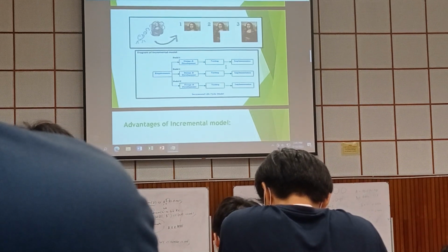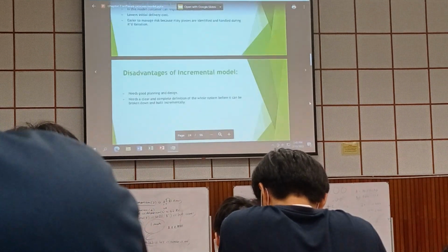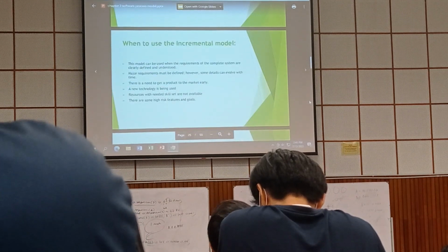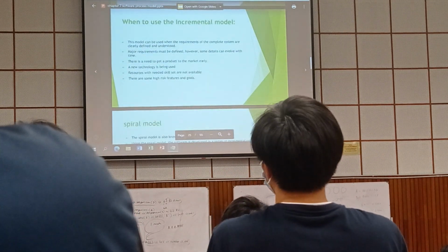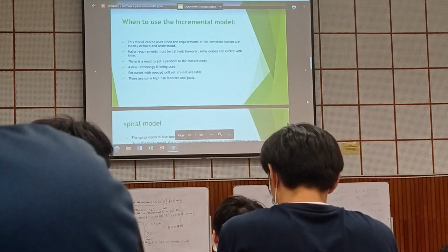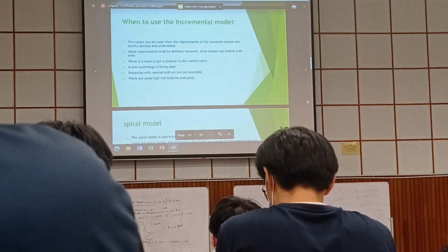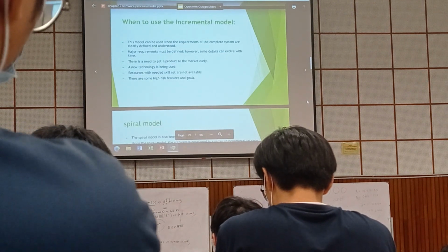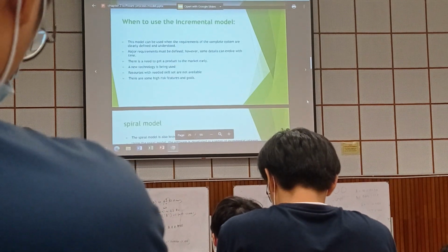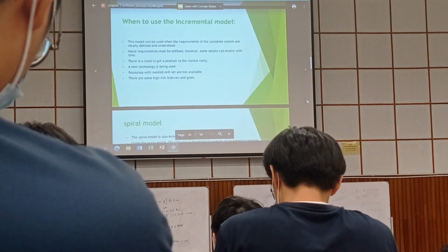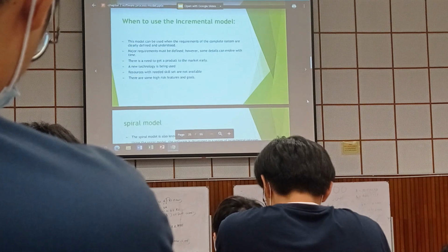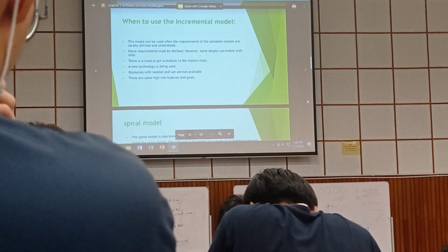So what are the advantages? Before that I will tell you when to use the incremental model. You can use this model if the requirements of the complete system are clearly defined. That means your customer who approaches you knows what they want.